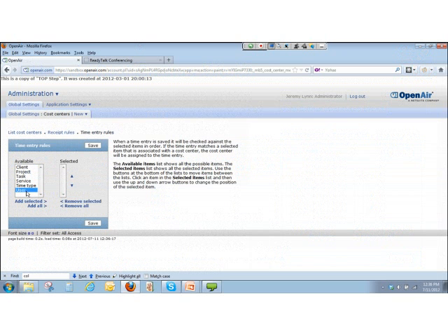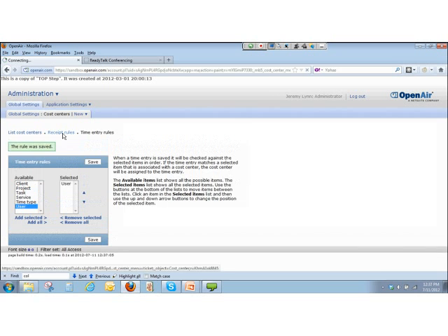So let's say that you have a user cost-driven model, where the cost follows the person. It doesn't matter where they work in the country or the world for your organization, the cost follows them. Okay? So you would actually put on your time entry rules that the cost center of the user is what is associated to the time entries, where the cost comes from the hours of time worked. And you could do the same thing on your receipts. Okay.